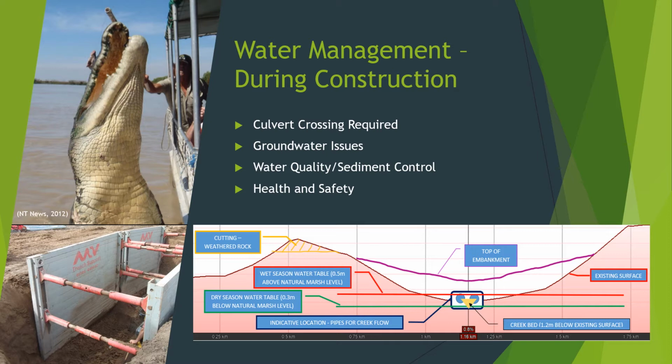In addition, water quality and sediment control are very hot topics in the Northern Territory due to the stormwater events that we do get up here. These need to be controlled by the contractor in terms of sealing the site and ensuring there's adequate control, such as sediment basins installed. And in addition, it is always important to remember health and safety issues when constructing works.